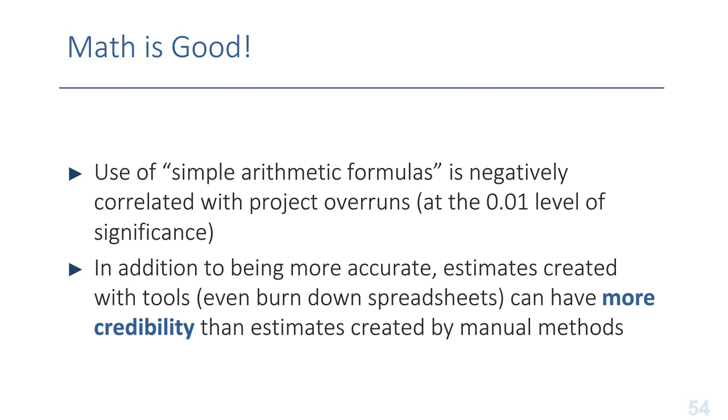And what that says really is that there's a world of difference between being in a meeting where your boss says, hey, can you give me an estimate for how long this project will take? And you say, oh, I don't really know. This is the first time I've heard about it in this meeting. And your boss says, oh, come on, we won't hold you to it, but you know more about this than anybody else does, so what's your best guess? If you actually reply to that with a number in that meeting, that is in the first category of intuition and off-the-cuff estimation, and your project is likely to overrun that estimate.